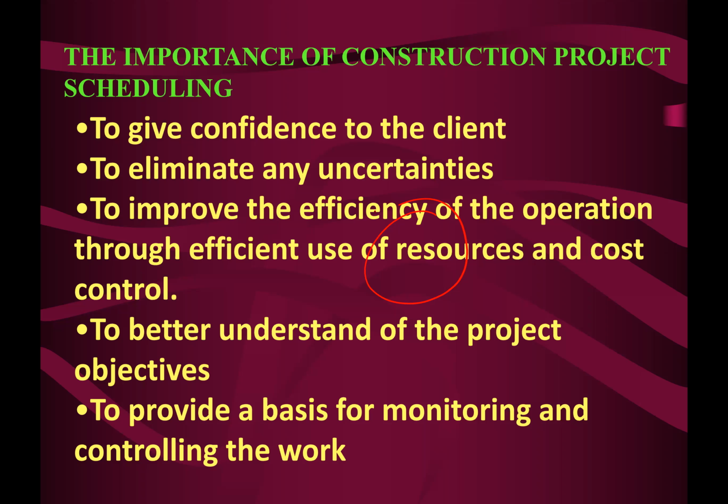Okay, can be measured. Meaning to say, you basically split up all the KPI of completing the bungalow project into smaller ones so that you can better manage the activities. If you do not attach what we call quantity, it's very difficult. How are you going to tell people to what extent you have achieved the work progress in terms of what percentage?